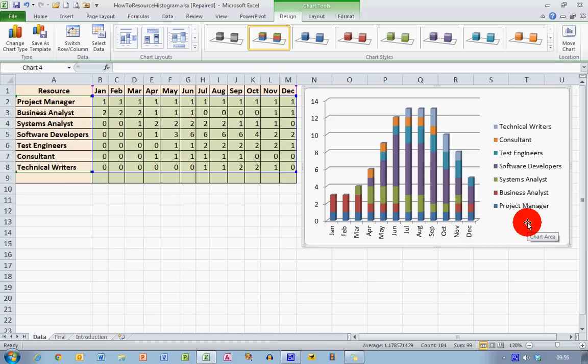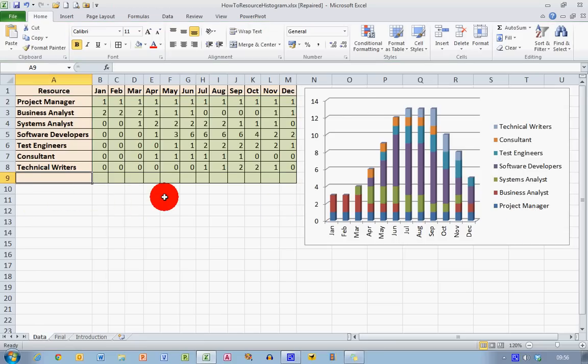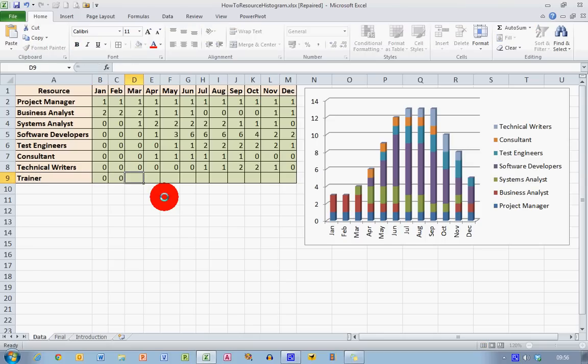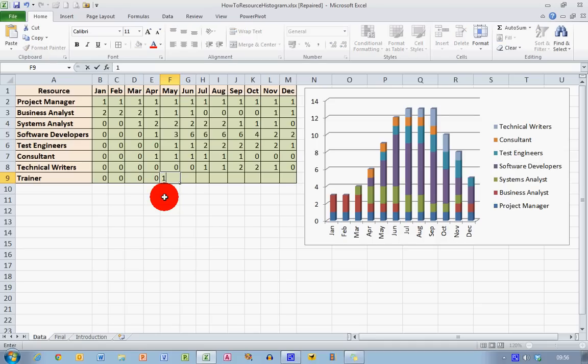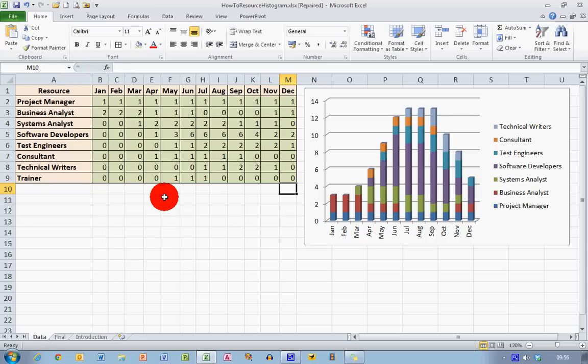Now supposing we need to add another resource into this table. Let's say for example in our project that we realise that after a while we're going to need a trainer. So let me put that in. A trainer is a resource added here. And I'm going to put in no trainer required for the first four months. And then we need one trainer for three months, May, June and July. And then no trainers for the rest of the project. So this is a new resource added in to my data.